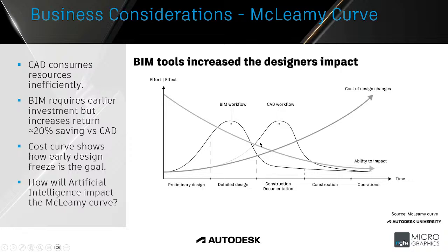So some of the work might have to be redone, and then the cost will increase. Or you'll have to do more work to redo a design due to the cost increases. That's a relatively simple graph to understand. Changes at the beginning of a project have a huge impact. The further down the line you make a design change, the more costly that will be.